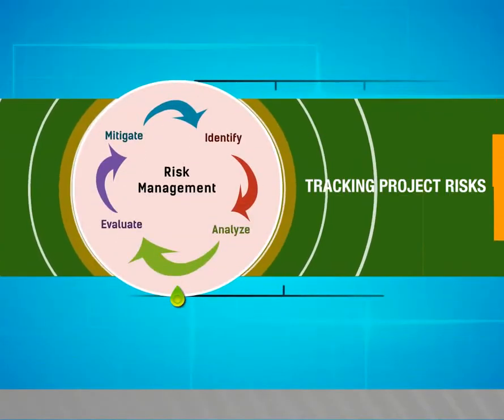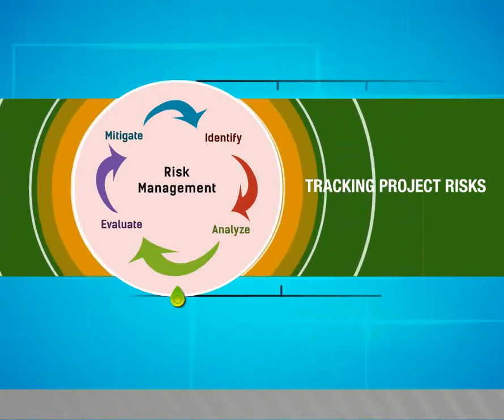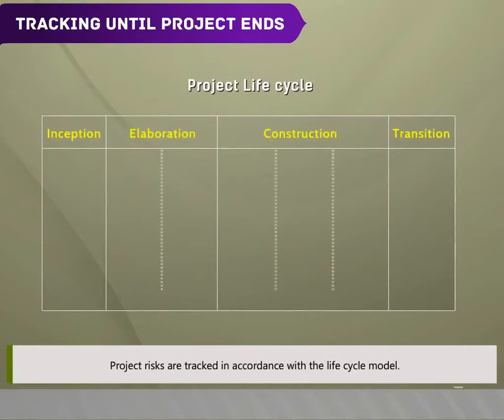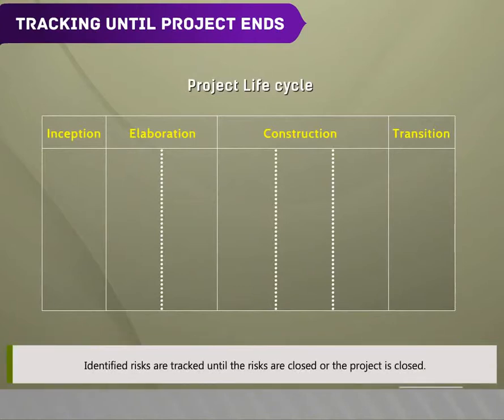Tracking project risks. In this video, we are going to learn about tracking project risks. Tracking until project ends. Project risks are tracked in accordance with the life cycle model. Identified risks are tracked until the risks are closed or the project is closed.